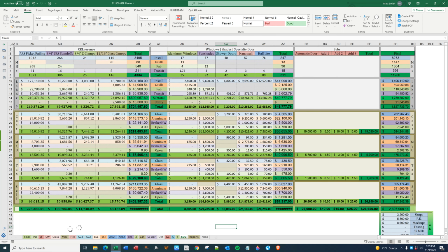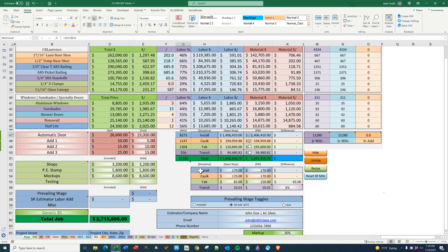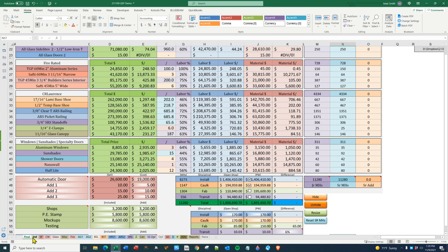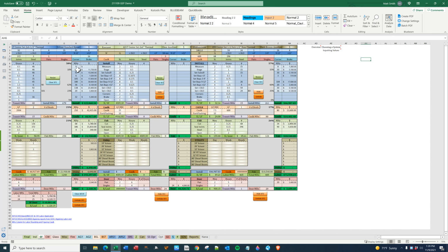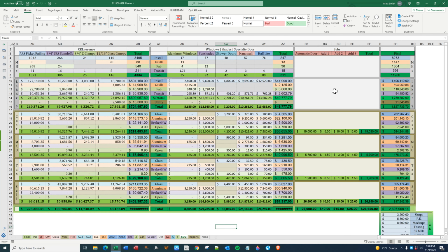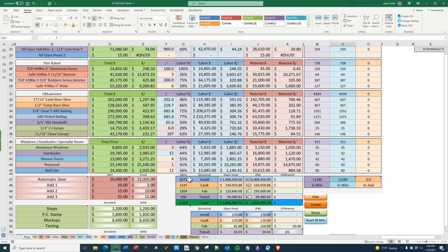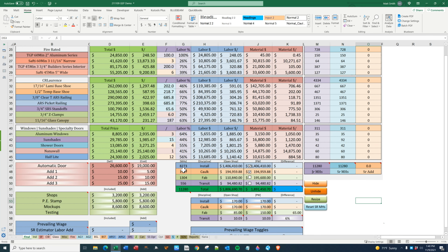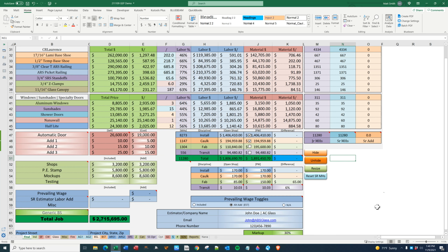So the cost of the man hour is established here. It is then applied throughout. There's your man hours there. It is then captured on SOV and summed, which returns it back to final to establish this and give you your totals, right? And that is generally it.